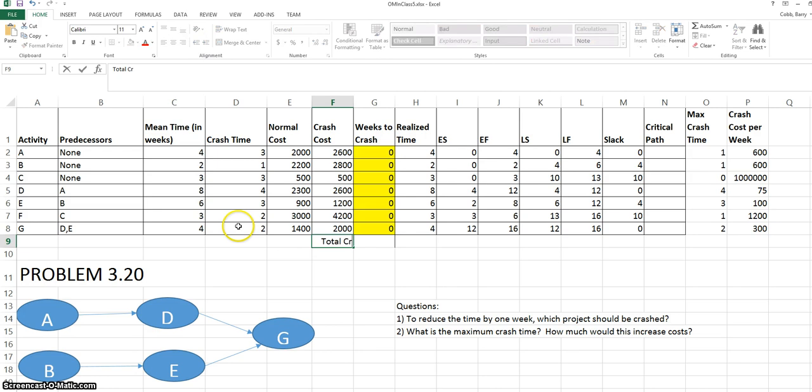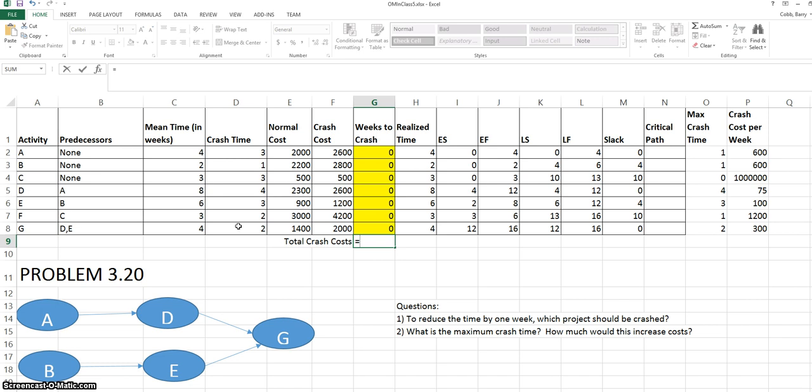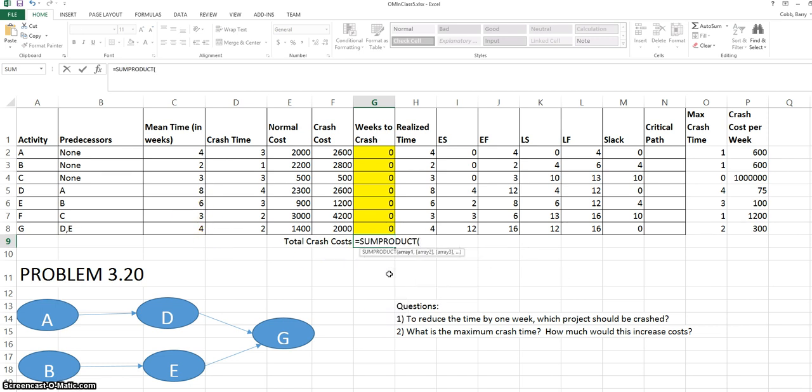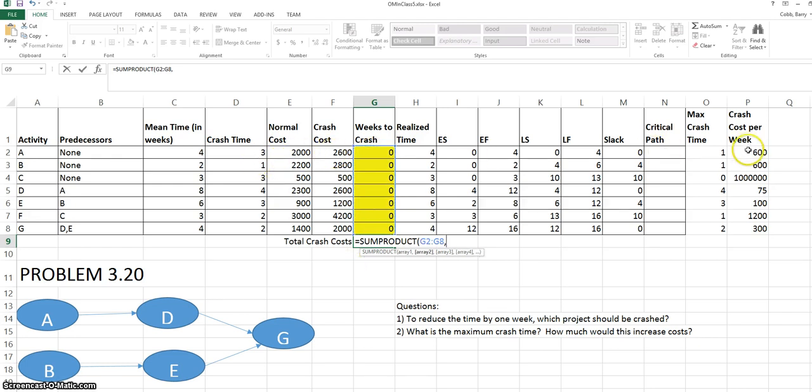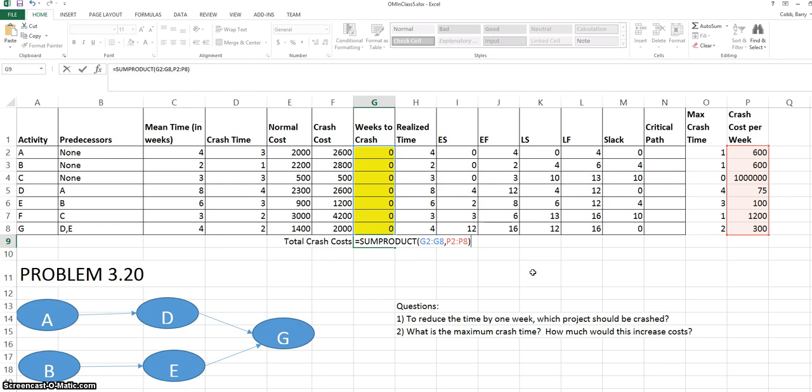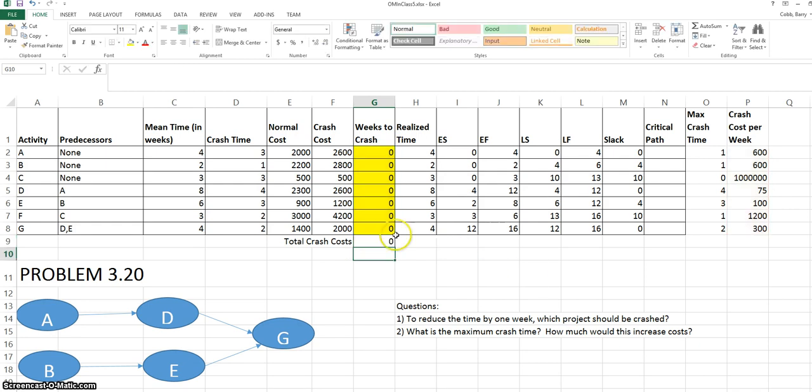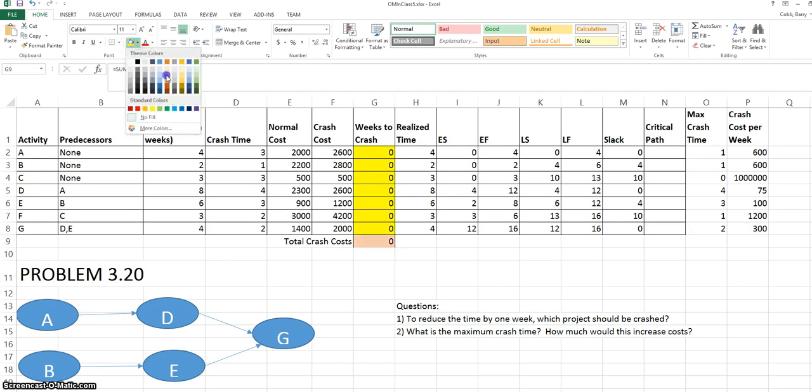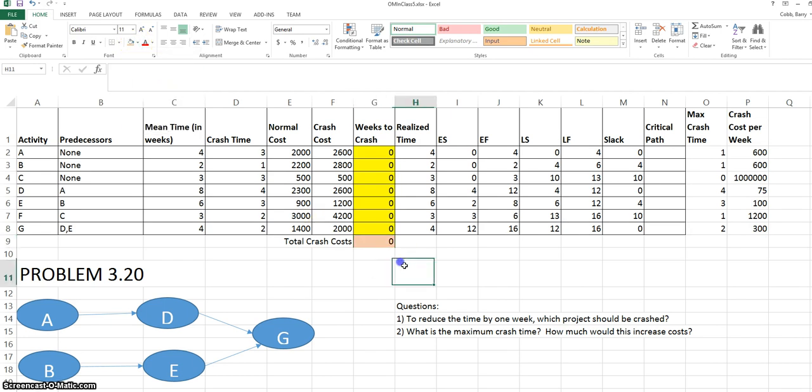We'll calculate the total crash costs for the project. This will be the sum product of the weeks we choose to crash and the crash costs per week. This will be the objective cell, and so it's easily identified. I'm going to give it a different color.